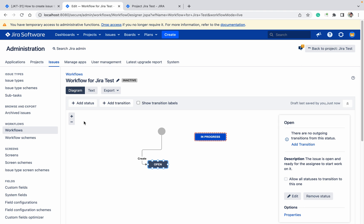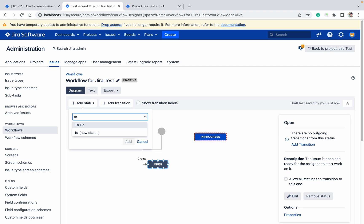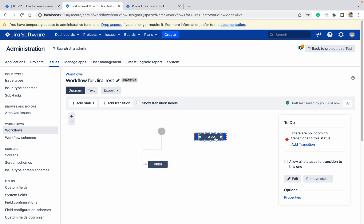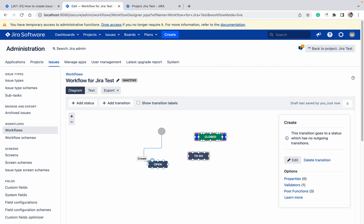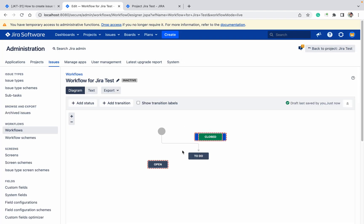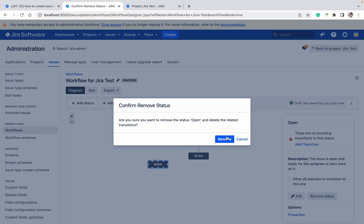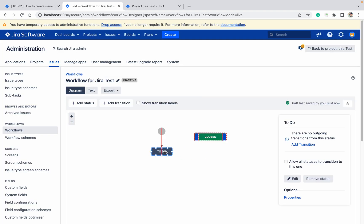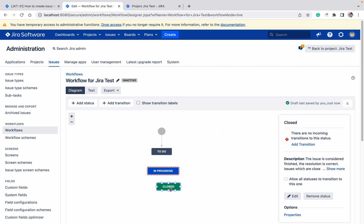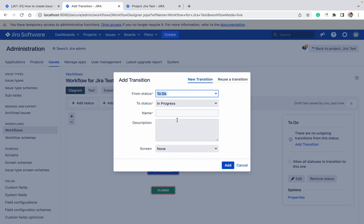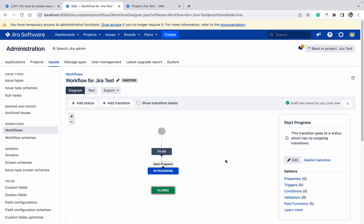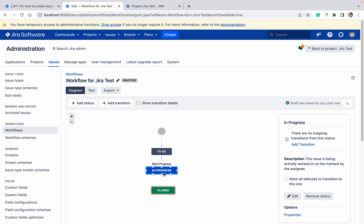If you want to remove 'Open' — since 'Open' is already there but I want 'To Do' instead — just click on it and drag it out. Click 'Remove status' and it will be removed. Now 'To Do' is there. I also want 'In Progress' and 'Closed'. From 'To Do', to go to 'In Progress', you need to add a transition. Give it any name — I'm giving it 'Start Progress' — then click Add.